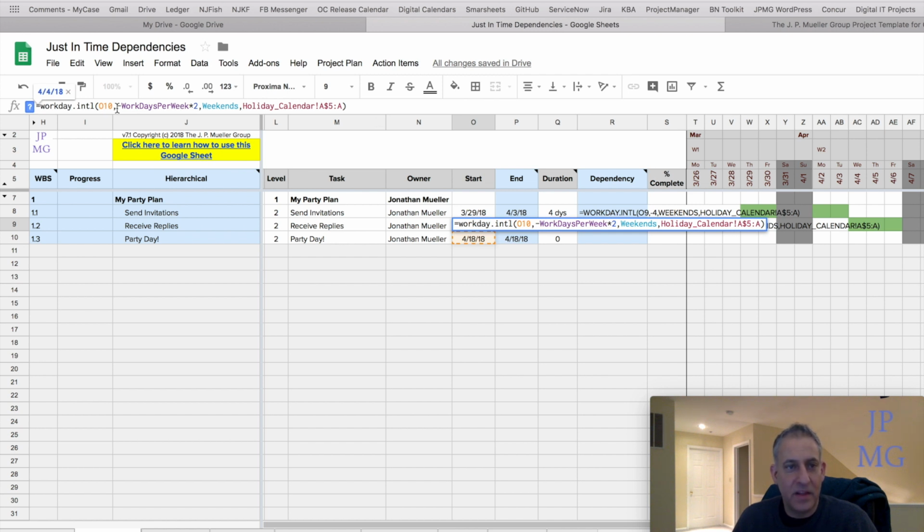Okay. The next argument I have to put is the amount of time or days that we want to add to 010 to get the date that we're trying to calculate. Now in this case, we want that date to be prior to 010. So we're going to put a negative in there, a minus. Okay, so if I wanted to go 1 day back, I'd put -1. If I wanted to go 2 days back, I'd put -2. It's always a function of days.